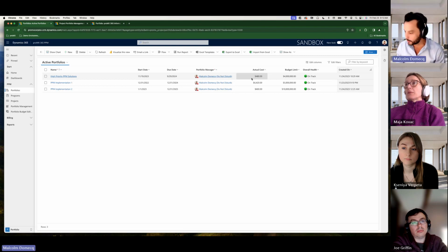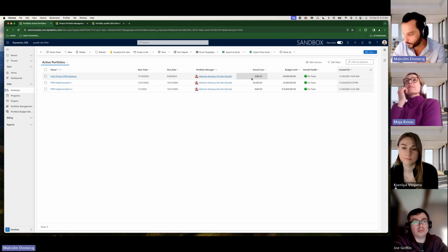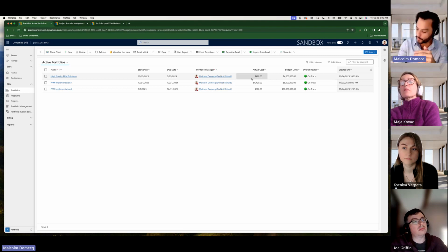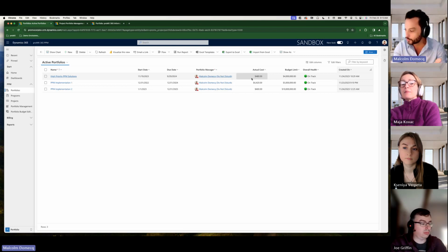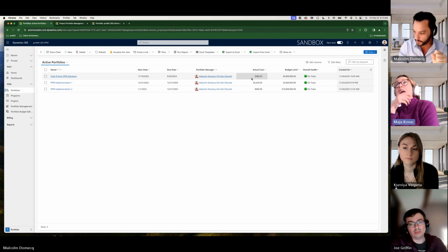That means yes and no. You can define your own budget for the portfolio, and this is where the control capabilities come in, right? So if you start with a portfolio and they say my budget is $10 million, okay, and then you keep on adding projects to your portfolio, and the individual budgets go above that budget, there goes your first alert. Right? There goes your first trigger for you to do something about this. You need to modify the budgets at the project level that accumulate up to the portfolio. Is that clear? Yeah.